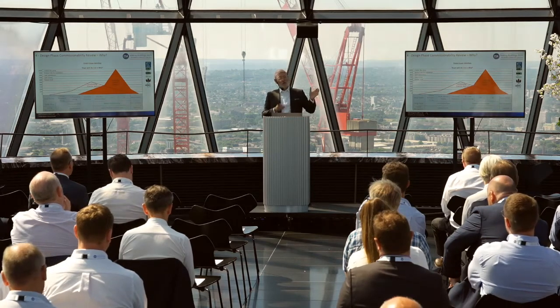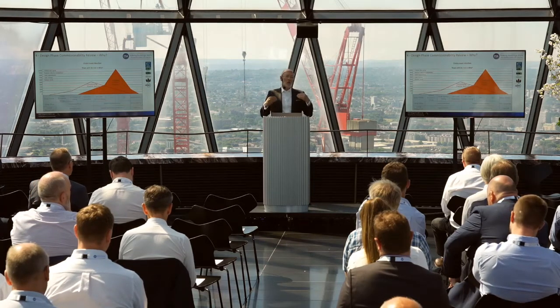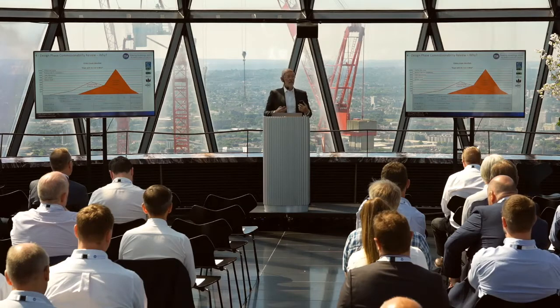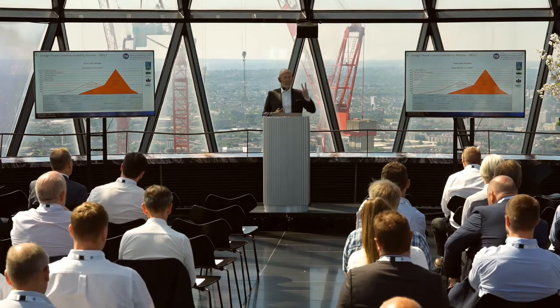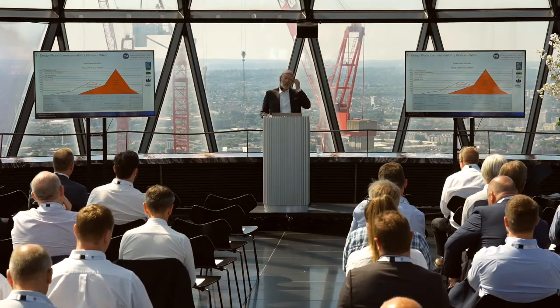If you find a problem, the later you find that problem in construction, the more it costs. If you are on a job site and you see someone ripping something out because there's a problem, that's a double economic loss. One, you've got the cost of fixing it, and two, while people are fixing it, they're not progressing the job. Who pays for that? Normally the client out of the contingency budget.